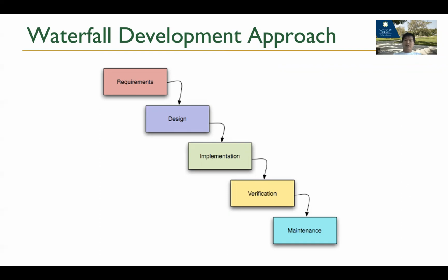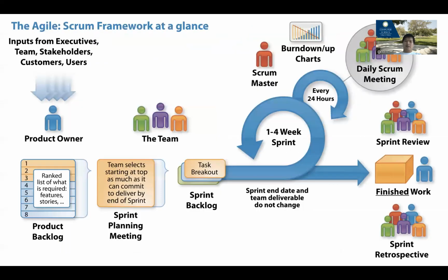Well, the answer is, at the end of the first month, we do not expect you to finish all the features, all the functionalities. You only need to deliver, for example, 10% of the features, since this is a year project. But that's okay. Even that 10%, I can give the customers quite a lot of view, and they can give a lot of good feedback and make sure that you are on track. So if you can do this kind of more frequent delivery and checking, then your software will be much safer. All right. So that's what we call Agile development.